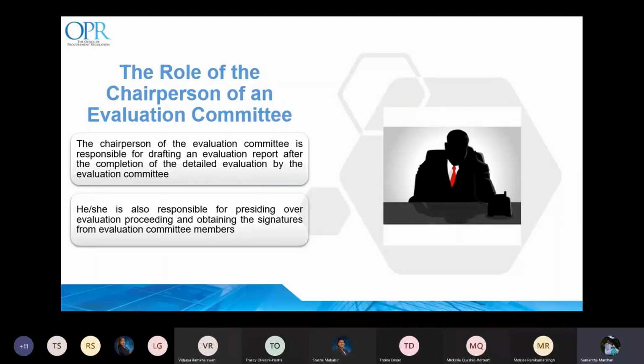Of note, it is important that throughout the evaluation process, transparency is maintained and is seen to be maintained. It is important that the evaluation committee deals with the evaluation process and the bidders in a consistent and transparent manner. Applying a standard approach eliminates some of the personal bias and takes some of the arbitrariness out of the scoring. A clear and documented audit trail must be provided. All decisions and the reasons for them should be clearly documented, signed by the responsible parties, and filed with the bid documents.